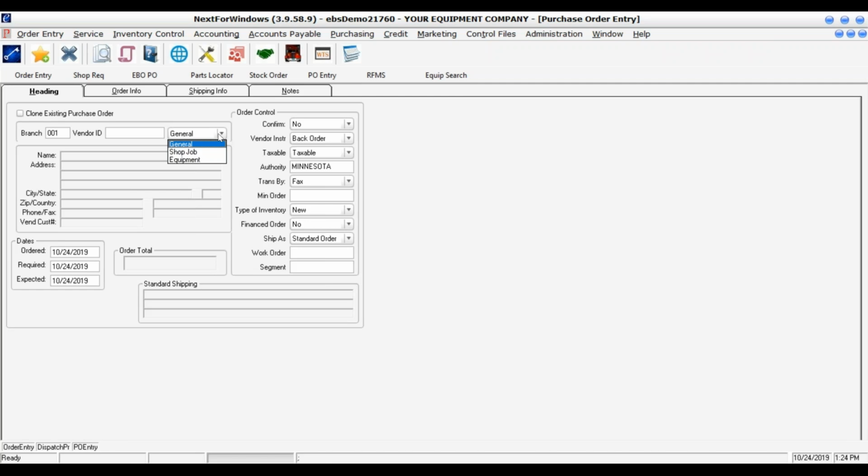For best practices, one of the things that we recommend is that, when you issue a purchase order, go ahead and create the equipment ID or the asset number at the time of the purchase order. So what happens, it goes into an on-order status. Then you can start opening up work orders, buying things from other vendors or manufacturers, adding those to that piece of equipment. And then when you receive that piece of equipment, it becomes available, unless you've already sold it.